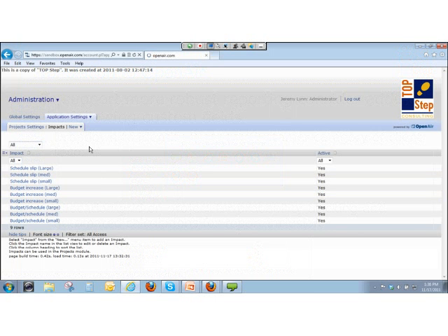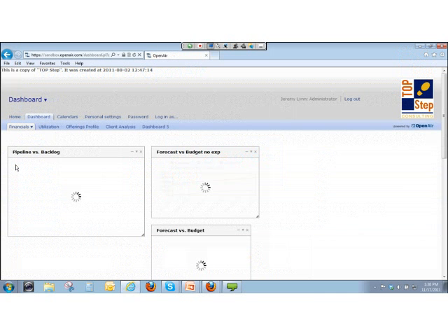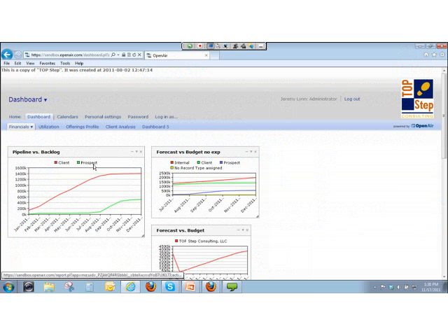And another grid, so let me just flip to a dashboard view here. You'll be able to see just from this graph here, pipeline versus backlog, once it shows up. Just by simply adding this drop-down to the definition of the client record, I'm able to get a lot more information, because the green line here is pipeline work. These are proposals that are not signed yet, and that's being identified as a high volume of work, whereas I've still got quite a bit of client work to deliver as well. And breaking information down into those two categories gives you insight into what's coming in and what's already being worked on.